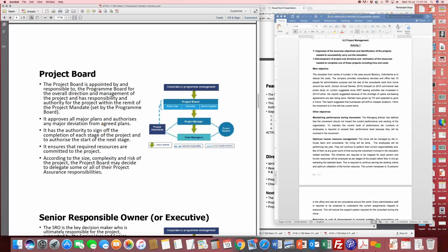So these were major deviations from when the Crown Prince signed off the plan, saying, okay, I'll sign off this budget and in 18 months this tower is going to be built. But it was never built in 18 months. It took 2.5 years, and the cost went from 1.1 to 1.6. These things were signed off by the board, because they were presented back to him saying we underestimated the cost of steel, the currency fluctuation, the cost of labor, things like that. In that case, that is the responsibility of the project board.